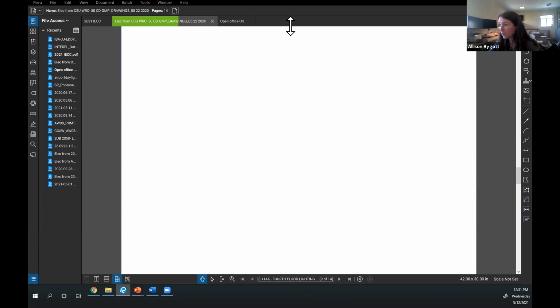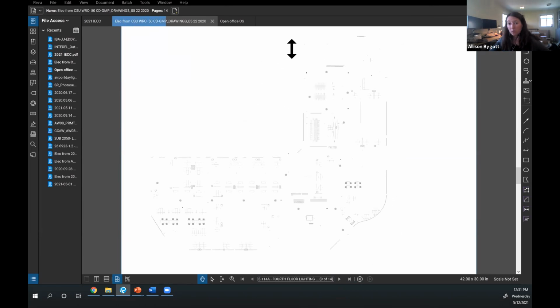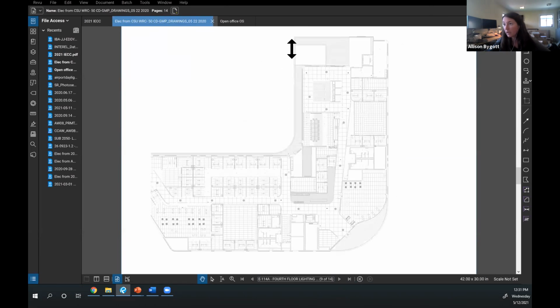I'm gonna check real quick. Okay, there's one question so far. The question is, after commissioning, who is responsible for maintaining the programming? That's the owner. You know, once turnover occurs, the owner is responsible for maintaining the programming.